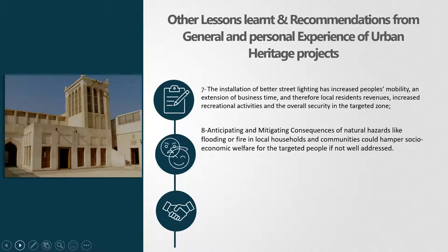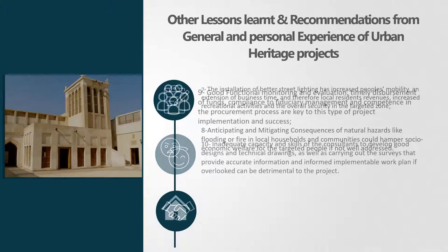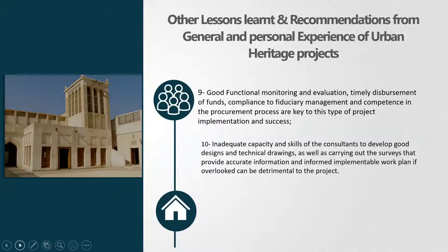In terms of functional monitoring and evaluation, the timely disbursement of funds, compliance with fiduciary management, and competence in the procurement process are key for this type of project and to ensure a successful implementation. Inadequate capacity and skills of the consultant to develop good design and technical drawings, as well as to carry out the surveys that provide accurate information and inform an implementable work plan, if overlooked, can be detrimental to the overall project.